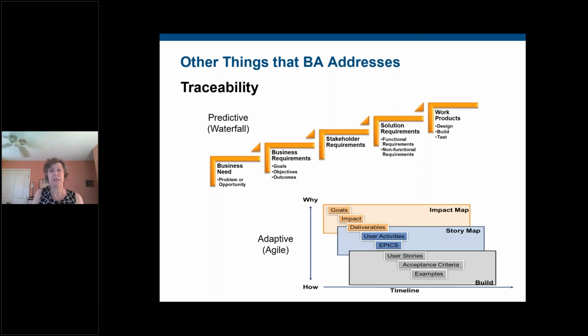The other thing that traceability does is it makes sure that a requirement is traced to things like maybe artifacts that we have, could be design docs, test cases, various models that we have created that support that requirement. And so it's a way to make sure that we have everything we need for this requirement, so that we don't end up somewhere downstream and realize, ooh, we don't have test cases for that, or oh, gee, we don't have any design docs for that. So that as we're moving through that, we're ready for what it is that's coming.